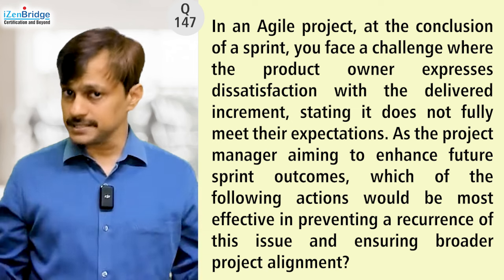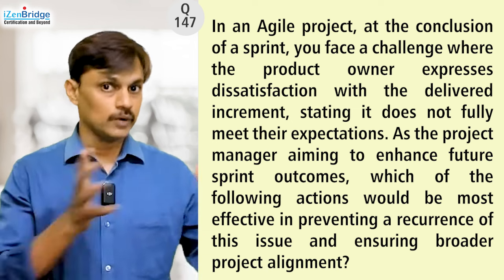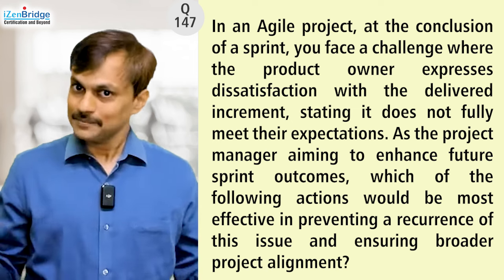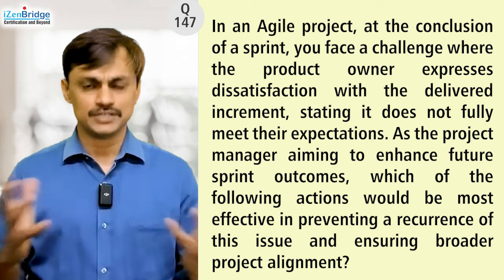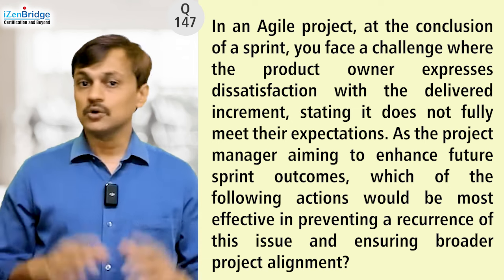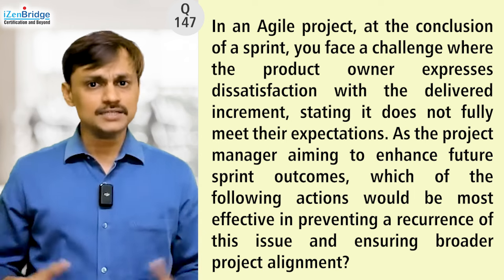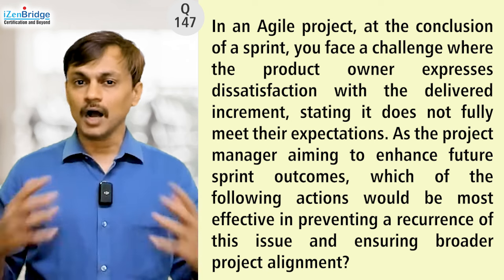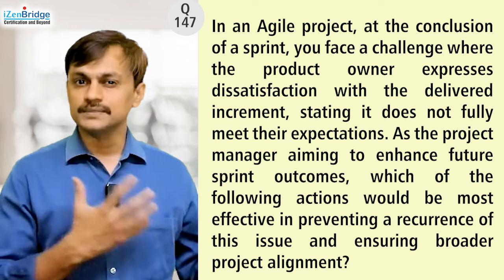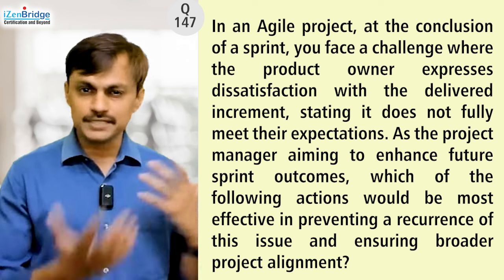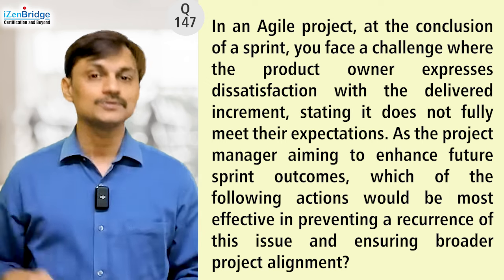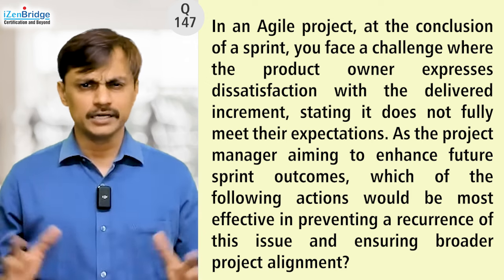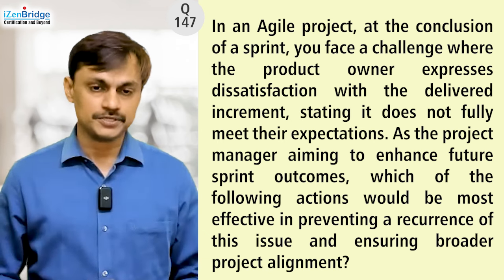This is the simplest type of question if you understand agile, but simple questions will come in your PMP exam as well — it doesn't have to be ambiguous and complicated all the time. This question is asking: in the agile ways of working, how do you improve? How do you remove the misunderstandings and conflicts from the previous sprint? This is pointing to a retrospective meeting. Let's see if we get an option clearly defining the retrospective.